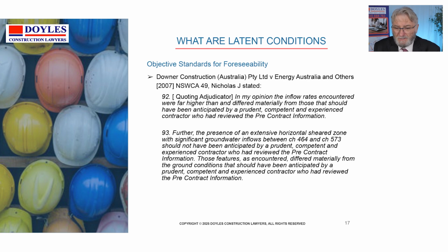That came up in a case of Downer Constructions and Energy Australia, where the adjudicator said, in my opinion, the inflow is far higher than and differed materially from what would have been anticipated by a prudent, competent contractor who'd viewed the pre-contract information. And then went on to say the presence of extensive horizontal features with significant groundwater flows between change this and change that should not have been anticipated by a prudent contractor who's looking at the job. So the situation there is they were prepared to say not only is the condition latent, but its extent and the significance of its extent may be latent.